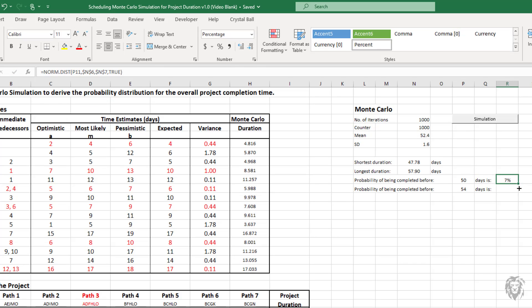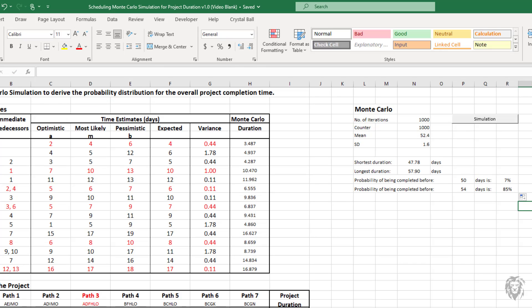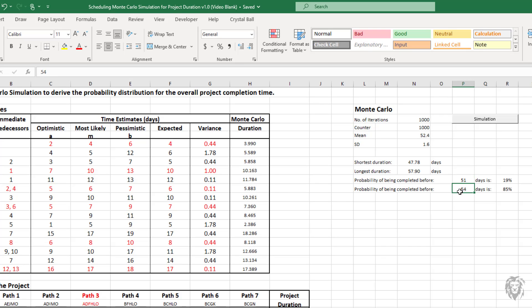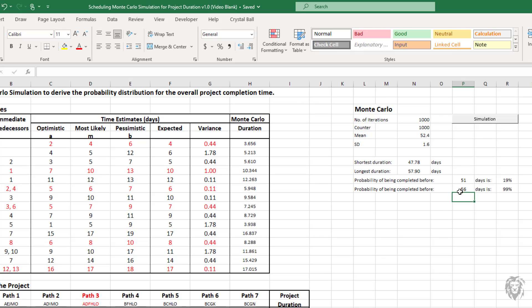And then because of the way we set that up, we should just be able to copy that down. And so we have a couple different things that we can play with. If we want to know, say, 51 weeks It's 19% likely to be completed before 51 weeks. Say 56 weeks. We're looking at almost 100% certainty that it'll be completed. And so we're starting to get some really great information.